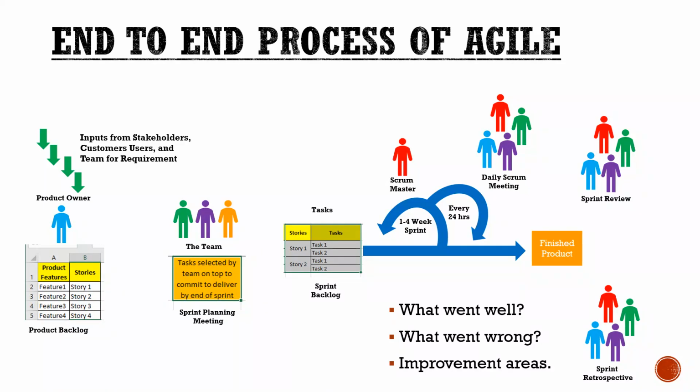So based on the finished product we analyze what are the things pending in the sprint backlog and the existing product backlog. Based on that we will take up the stories, and in this we identify people who will take the story. That is the main thing, and each of them will size the story also, because we make an estimation of how fast we can complete the story. Everybody will be part of the estimation, the development team and testing team, on how much time they can complete the user story based on acceptance criteria.